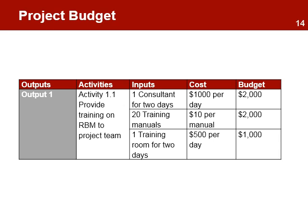This can help produce the project procurement plan. The total cost of all activities and the administrative and other general costs associated with the project represent the total budget of the project. This plan will help monitor the budget expenditures.